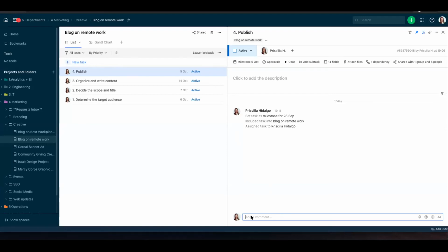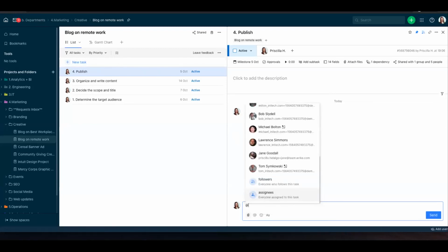To properly communicate in Wrike, you should use the add mention in the comment section. If you add mention someone in Wrike, two actions will happen. You will be sharing this item with that person, giving them access and visibility. And second, the person that got the add mention will now receive a message to his or her inbox. The inbox is located in the upper part of your folder tree structure.